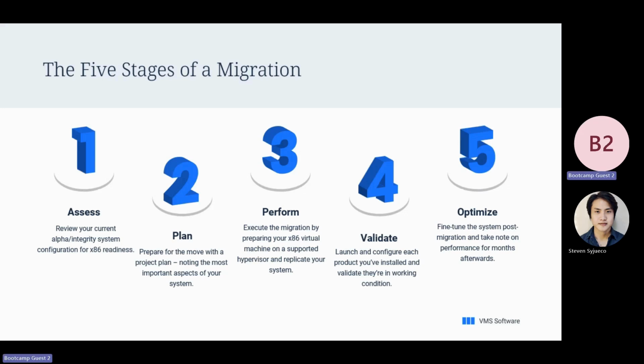Third is when we perform. Dave and I have found that the best way to perform a migration is to chunk it out in 4-hour blocks per system disk. A lot of customers have 2-3 node systems with multiple clusters, and it could take a 1 to 2, 3 day undertaking. So you want to make sure that you plan for enough downtime that if anything does go wrong, that you have an extra day or two to recover that and make sure your system's in place.